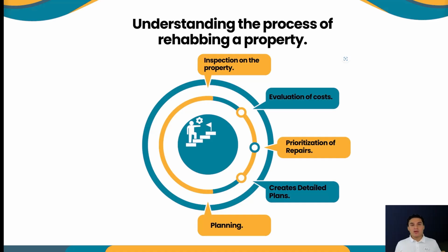Why? Because now you're going to get into the specifics of knowing how much it's going to cost you to change each item. Now you don't have to do a full rehab at $50 per square foot, $40 per square foot. This is just a shortcut that I use in order to calculate how much it's going to cost me. Now that I know specifically how much each item is going to cost me, either way I make my calculations at $50 a square foot, even though in reality it's only going to cost me $35 a square foot. That's because now I'm using that cushion for extra gains.